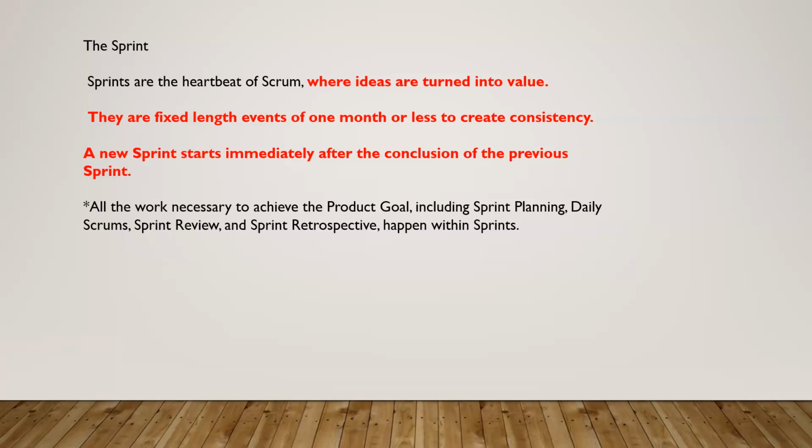Let me explain. The product backlog is going to have the list of all items which are to be worked upon. You will be selecting a few of the items from the product backlog and putting them in your sprint backlog. One of the features could be a combination of tasks that you have taken. So, was it decided before the sprint planning? Yes, it could be before that, or sometimes it could be during the sprint planning itself.